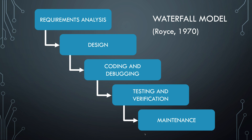This model follows the slightly naive assumption that there are five fixed consecutive steps in software development. We start with an analysis of requirements — what does the customer want? In the next step the software is designed according to those requirements. In the third step actual code is written. Then the software is tested by the engineers and the customer indicates whether the software adheres to the requirements defined in the first step. And finally the software needs to be maintained after it has been shipped.